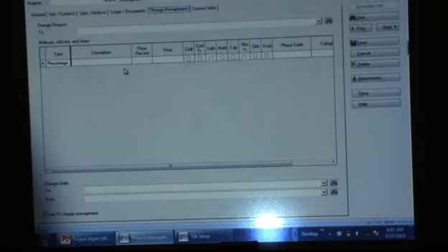You have control over that. During job setup, you can specify how much markup we're allowed on this job, so it will automatically add the markup. Or you can leave it blank, and then each time you send a request, you can manually adjust the markup. Or manually adjust the price so that it includes a markup, but it's not shown as here's the base price, here's the markup, here's what I'm charging you. You can just show it to your customer as here's the price. So you have that flexibility.